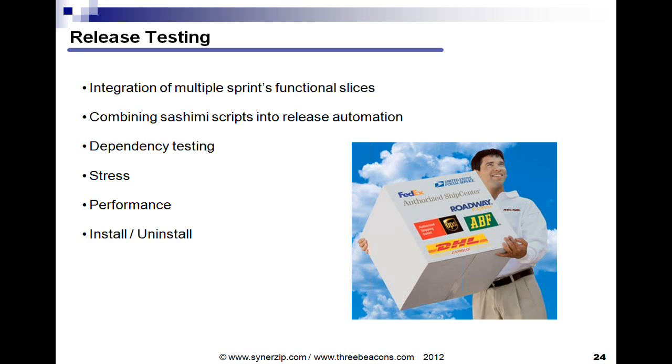Also, let me continue here so we can wrap up in about 5 minutes. The QA person's responsible for release testing, obviously, and since development is incremental, there generally is not a long work item for release testing at the very end, but it is normal to take a few days and re-verify all of the functional slices and that they're coexisting nicely together prior to an official release.